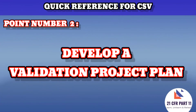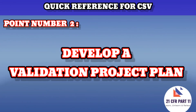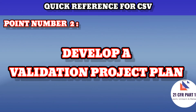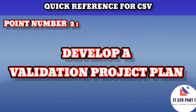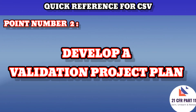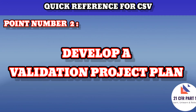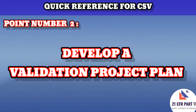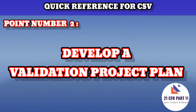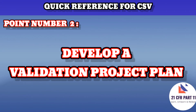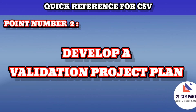Point number two says to develop a validation project plan. The regulatory expectation says the validation plan should define the activities, procedures, and responsibilities for establishing the adequacy of the system. The validation project plan is derived from the company's validation master plan, and it specifies the strategy, approach, risk assessment, resources, responsibilities, activities, and deliverables with a timetable. It can be written in table template or flow text form, and when to write it must be decided by the project team.